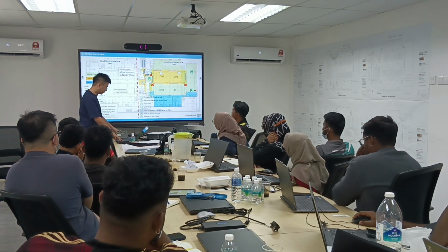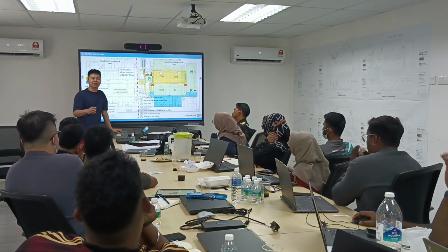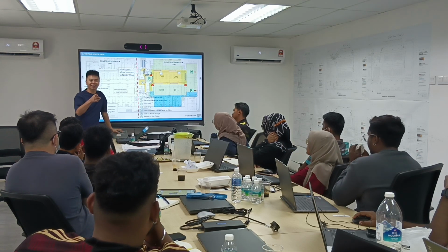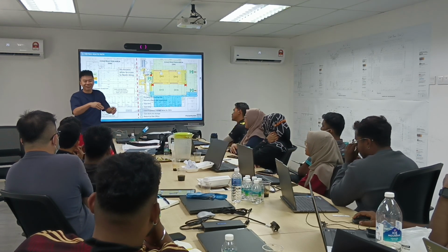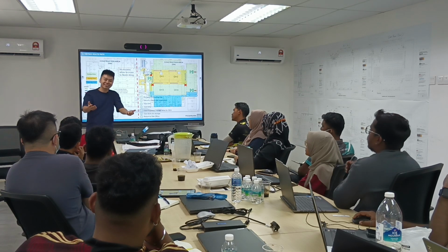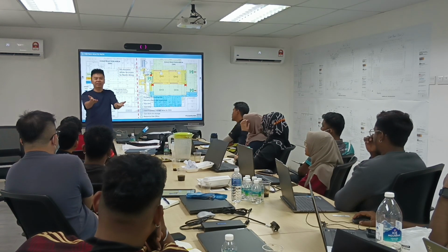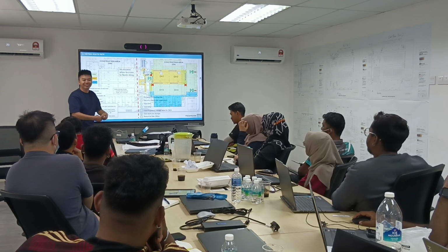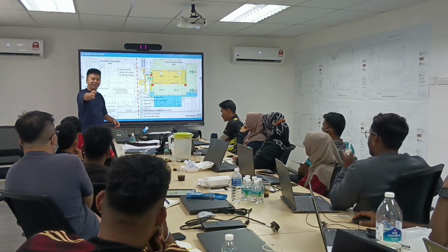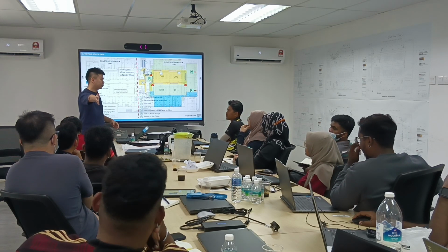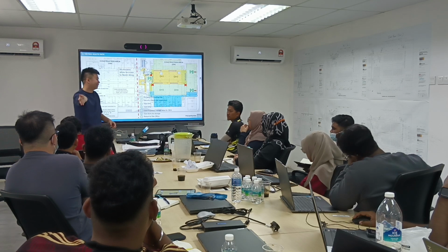recently I heard a very funny story. The fan wall and the switchboard all came together in JDC one, and then you all had a traffic jam at the loading bay, right? Why did this happen? Exactly, no proper planning. Because maybe he is handling the switchboard, maybe he is handling the fan wall.